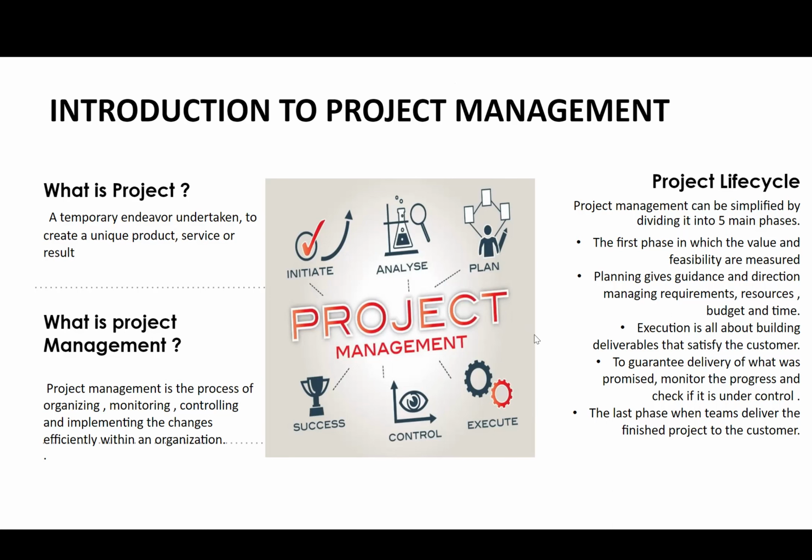The next phase is testing. Once it's been executed and the build has been done, that's when the test is also done. You want to test the website before going live with it, and I'll explain what I mean by going live. You put it into an environment where your team can go in and test, making sure everything works fine and that the customer journeys are smooth. All the good stuff you are putting onto the website should work fine. Then the test is completed and signed off, and you can now go live with it.